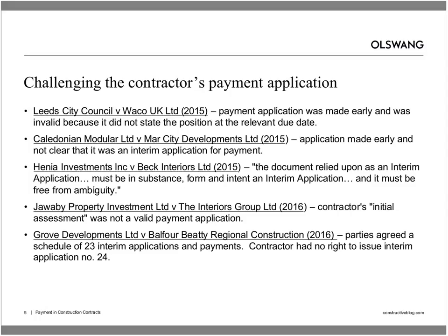So the court said that because the employer had regularly processed late payments, it wouldn't have been entitled to complain about a late payment application. But because it had only processed and paid one other early payment application, it was entitled to complain about that.